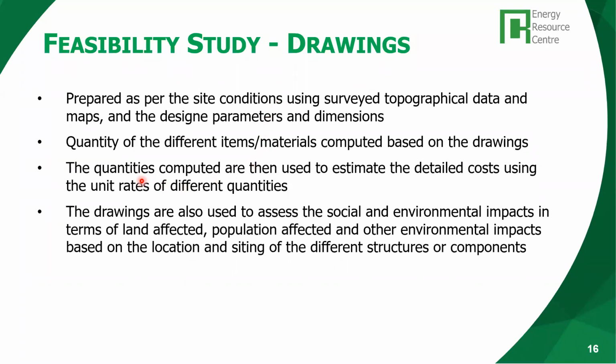These drawings are needed to estimate the quantity of the different items or materials of these structures. For example, how much concrete we need, how much earthwork, how much steel, how much wood, all the construction materials. We have to find the quantity, the cubic meters, the length of the pipe we need, the dimensions of the pipes, the steel structures we need.